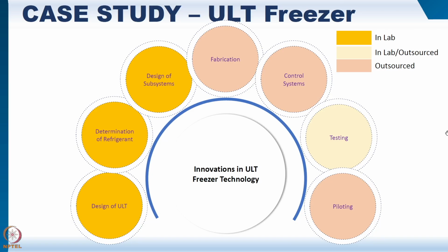We have outside industry where fabrication can be carried out and given back in one or two weeks' time. Having done that, we needed control systems. We are using other collaborators who would develop the control system for us, with safety and data acquisition etc. being worked out, and that has been outsourced to somebody else. Then we assemble the entire thing, and testing has been carried out in our laboratory or in a pilot place, which is also outsourced. The last thing is the pilot that is going on, and this is outsourced.